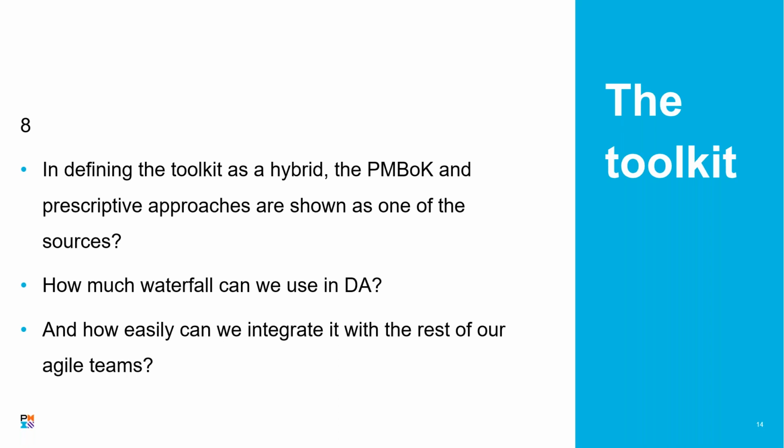Waterfall teams, though, are very frustrated with agile teams due to the lack of documentation, because detailed documentation written up front is actually a very risky proposition, which they're blind to. So you see very different cultures, and different views on risk that don't mesh well. For example, agile teams get frustrated with waterfall teams because there's usually no testing harness throughout most of the project, so they can't actually prove that any of their stuff is working. It's all big surprise until the very end, and then they discover it's not going so well. So in those articles, we work through what the issues are, how you deal with them, and how you overcome the arguments and the finger pointing. It's a topic probably worthy of a little white paper or book at some point.